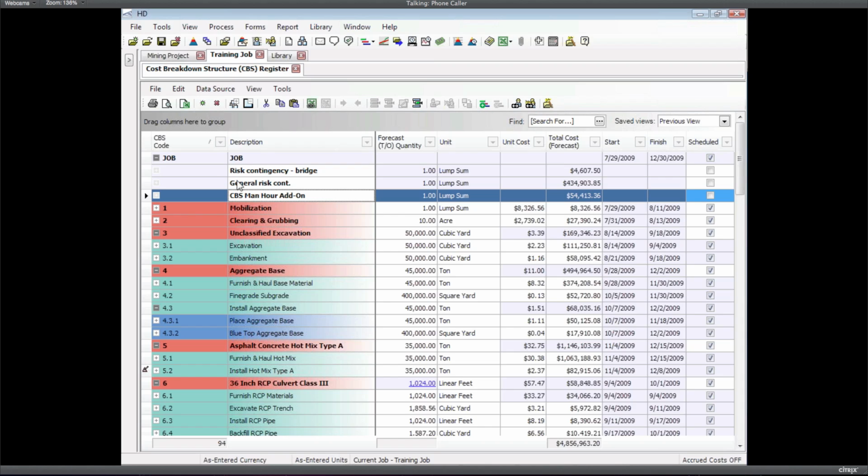Now, like any other indirect or dependent item that's not assigned to a pay item, those costs can be spread back to all the pay items or any subset of the pay items in the project. But as we're modeling the estimate, we're setting up the structure. They're going to be at the top. All those indirects are just buckets up there that we're accumulating costs in, and then we can decide what to do with them. How do we want to spread them?